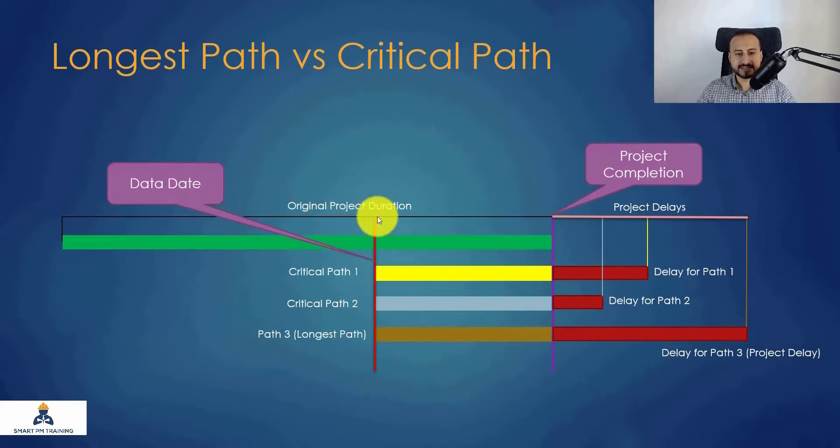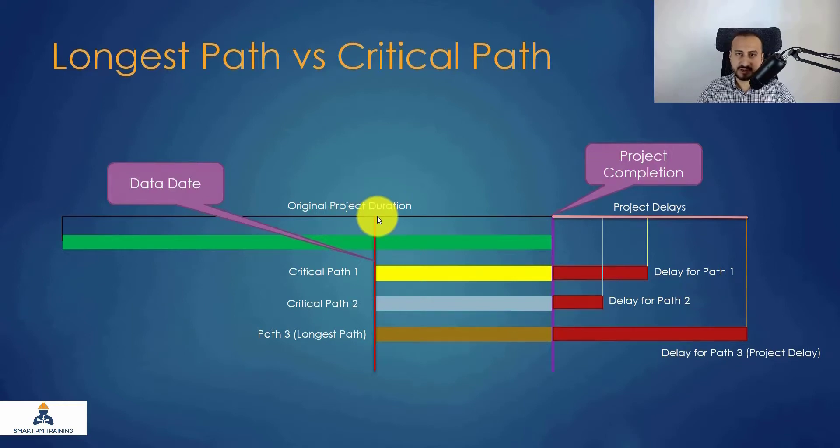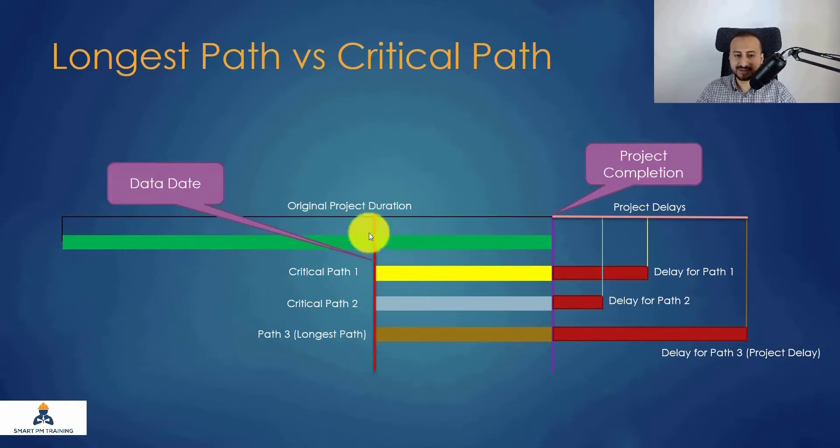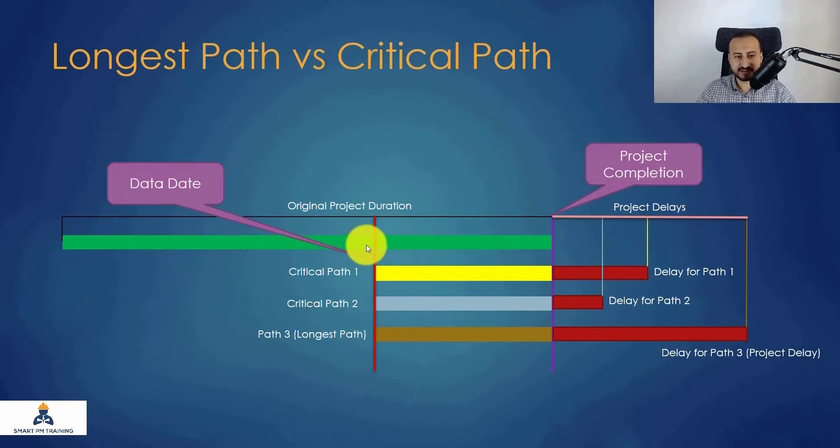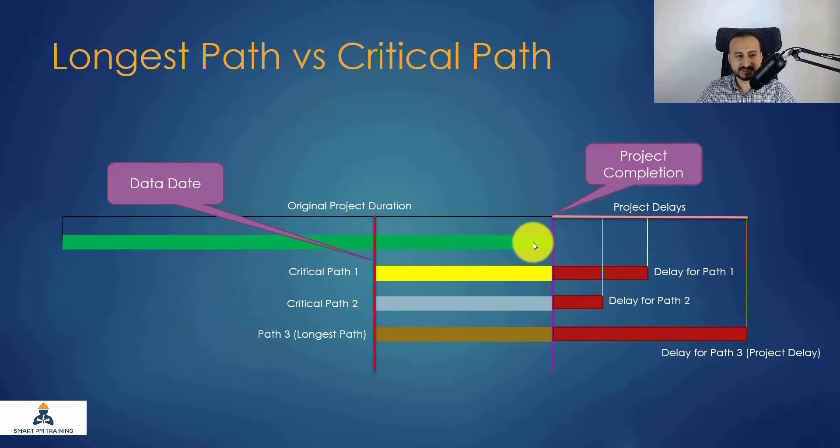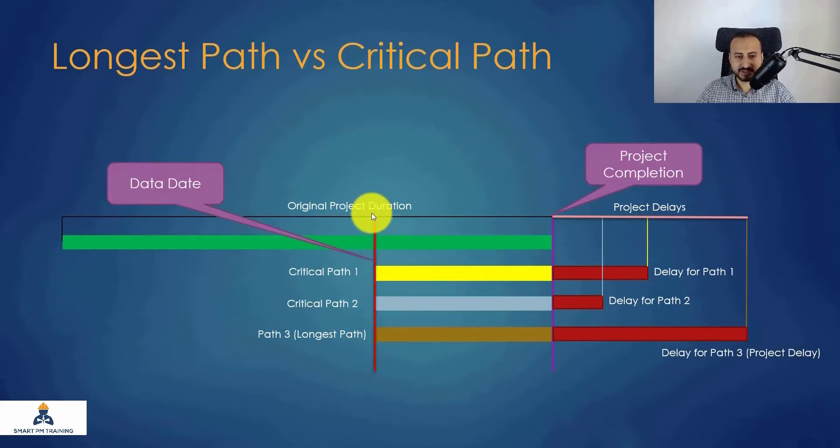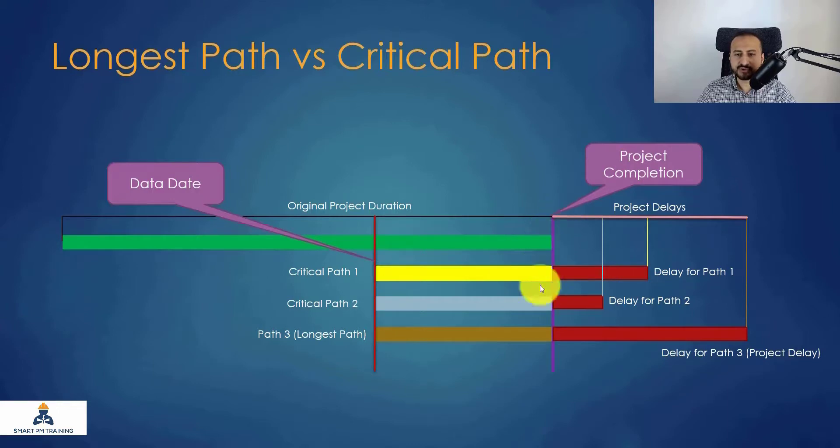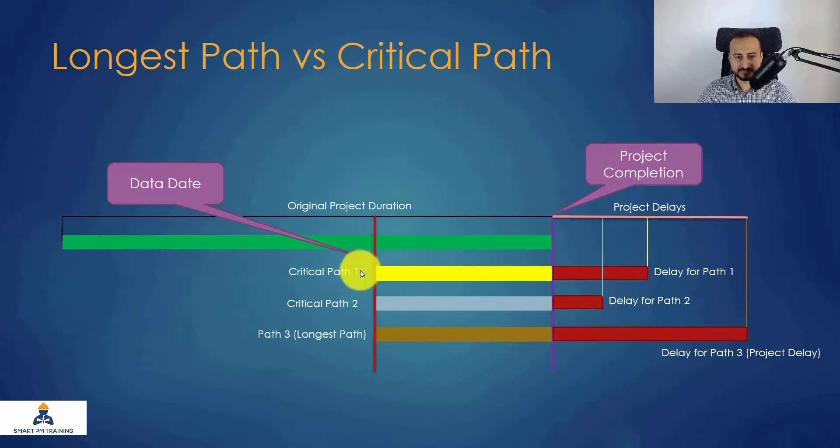Data date, we are doing one particular update right now, we are doing the schedule update right now, and this is the data date which is here at this point of the project around 60 percent for the project duration. So we are here now data date, and this is the original project completion, and this is all project delays.